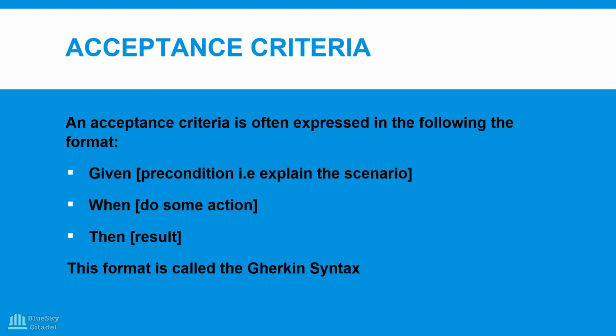The first one, a really popular one, is what we call the Gherkin syntax. All right, and the format is given, when, then. Now, caveat: please don't be hung up on the exact structure.